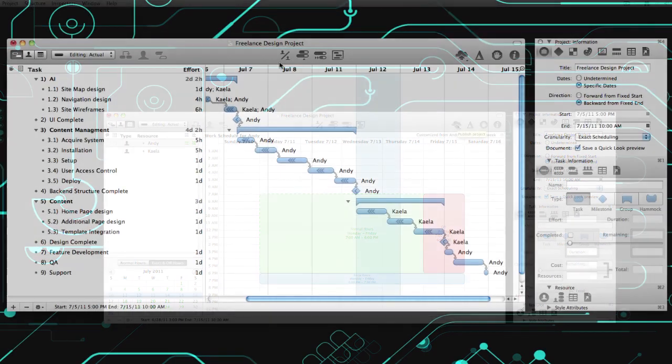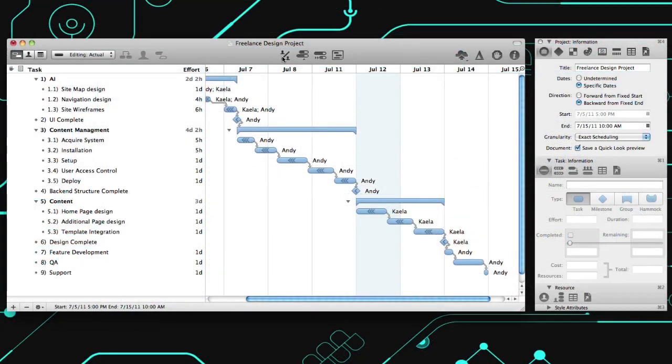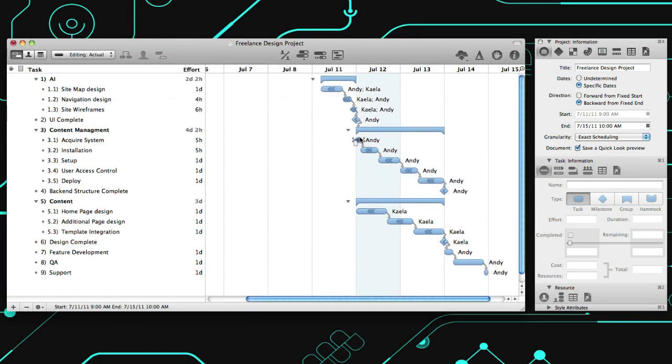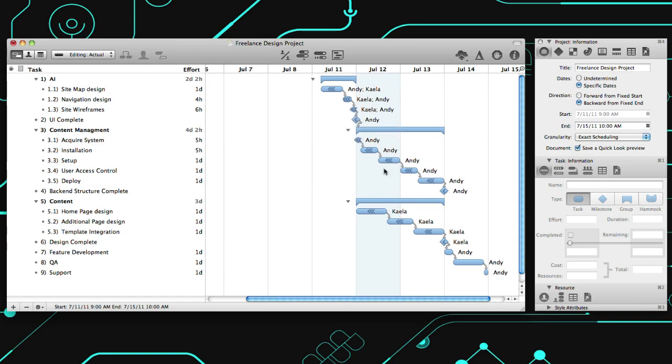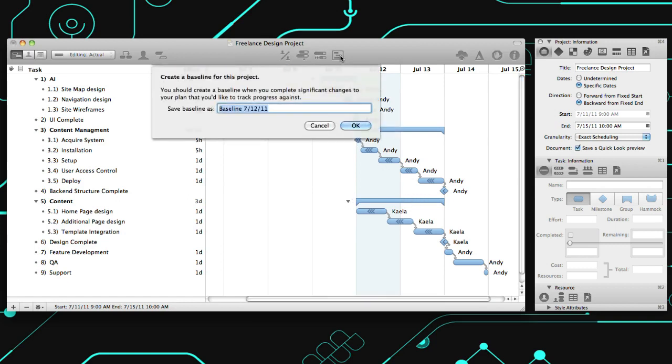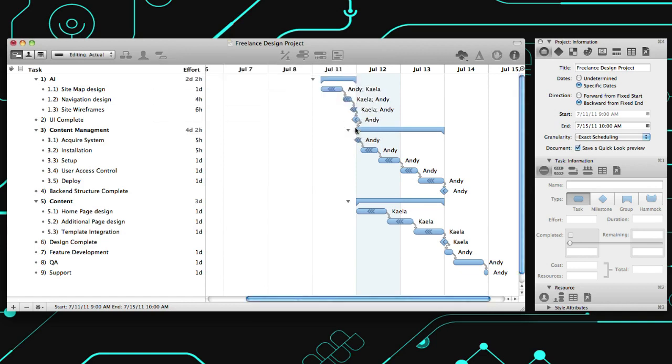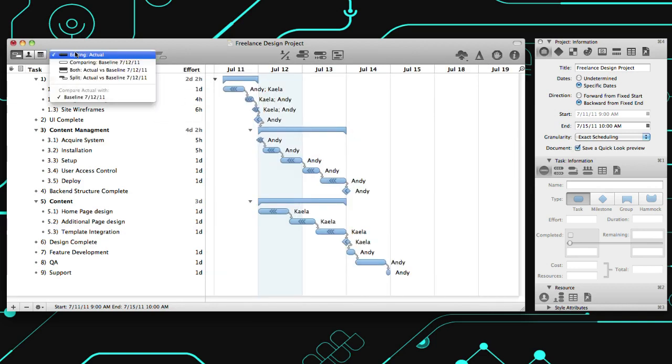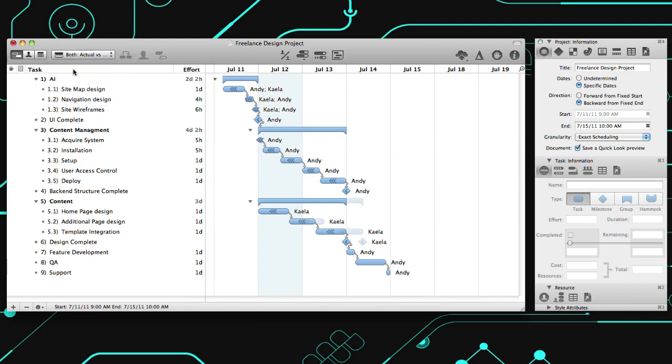Now that the plan is nearly set, it's time to level. This will balance out the plan by factoring in task dependencies and resource availability for optimal efficiency. When you're ready to commit to the plan schedule, click here to set the baseline. From here on, you can track development by comparing the set baseline with the actual plan in progress.